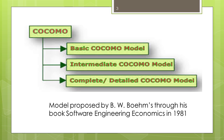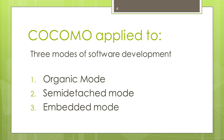All three models work on three modes of software development: organic mode, semi-detached mode, and embedded mode. Boehm postulated that any software development project can be classified into one of these three categories based on the development complexity. To classify a product, Boehm considered not only the characteristics of the product but also those of the development team and development environment. Roughly speaking, these three product classes correspond to application, utility, and system programs respectively.